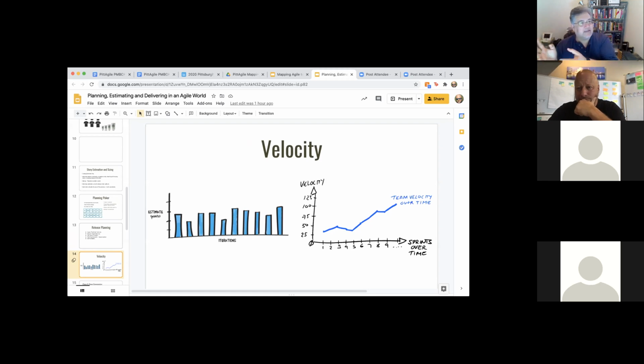And I've got twice the stakeholders, or I would have to do some of this at the same time, right, in order to get a good picture of what I can try to do in a sprint. Yes, that's a great question. So if you have multiple product owners, you'll do separate sizing sessions with them, right? You're not going to make one product owner size the work for another product owner.